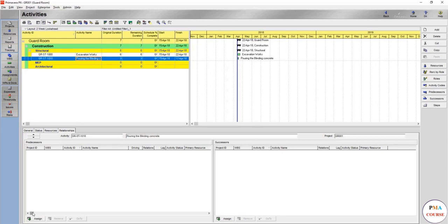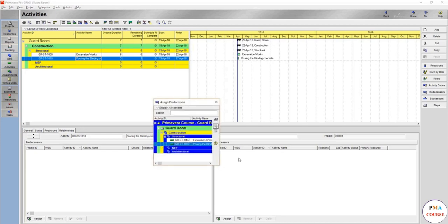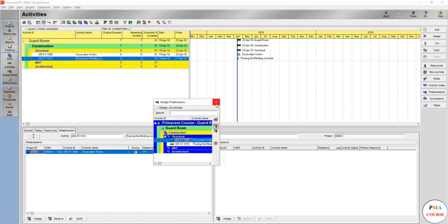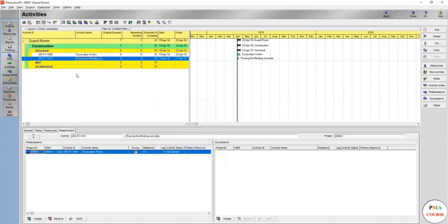If you come here, you can assign from the predecessors and choose. In such case, you only have one which is this one. So you're going to choose it. It will appear here in the predecessors under this tab, under the relationship tab, and it will automatically come with finish to start. This is one of the ways.